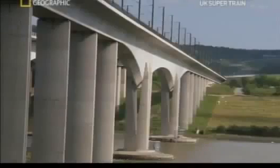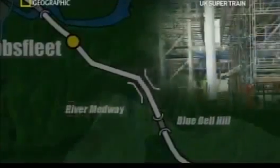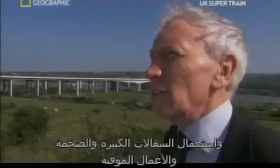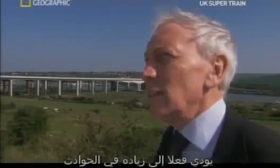Nothing can rattle this bridge. But as usual, solve one problem, another appears. To erect the bridge itself would take a forest of scaffolds. We were desperately trying to avoid unsafe practices, and the use of large extents of scaffolding and temporary works does lead to an increase in accidents.